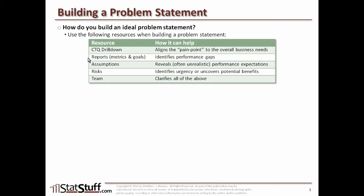If you know you're performing at a current state and you know you need to reach a particular goal or target, the gap between where you are and where you need to be is a clear definition of a problem statement. So if you have any reports like that, those could be very helpful. Any assumptions you know of can sometimes reveal certain expectations being set by leadership. Look for those within the different business area because they can help clarify things that might be leading to the pain or symptoms you're feeling. Any risks out there also can be a great source — they can identify some of the urgency or uncover any potential benefits.